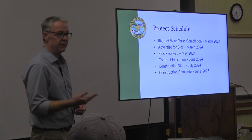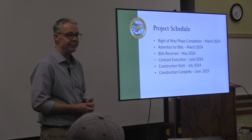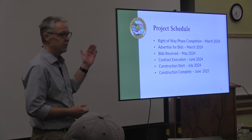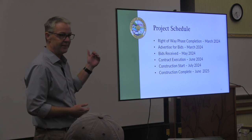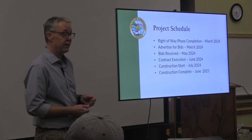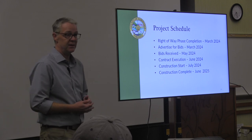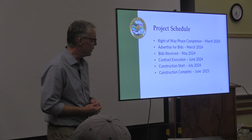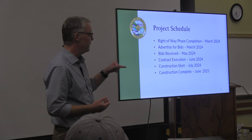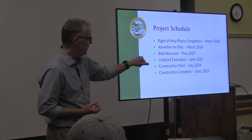That market has been really tight since the pandemic began, with supply chain issues and labor increases, and fuel was crazy for a while. Things seem to be settling down, so we're very hopeful that we'll get a good set of bids. We've been updating our estimates on a very regular basis to try to make this target. So that's a couple of month process before you get your bids in. So we'll find out in May.